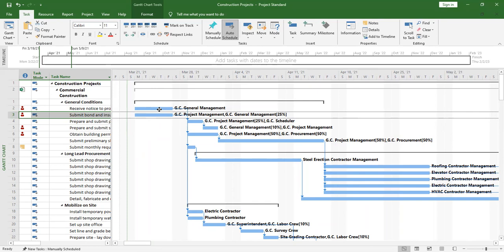So doing this, as long as you have resources, you can always crash a project. By project crashing, it means that you've been working on a project that has 2 years as the project duration. But when you've reached the first year, maybe it was a government project, they tell you, can you have the project in June instead of having it in December? Then what you have to do is you crash the project.